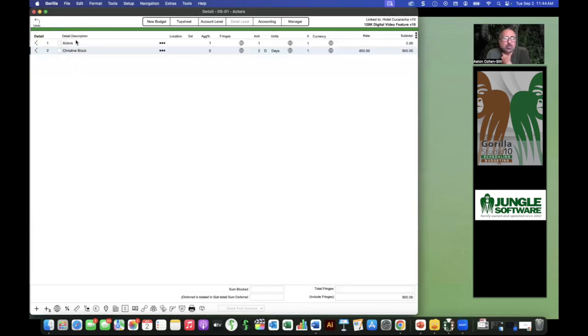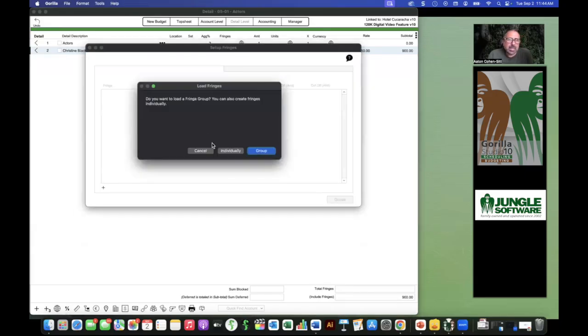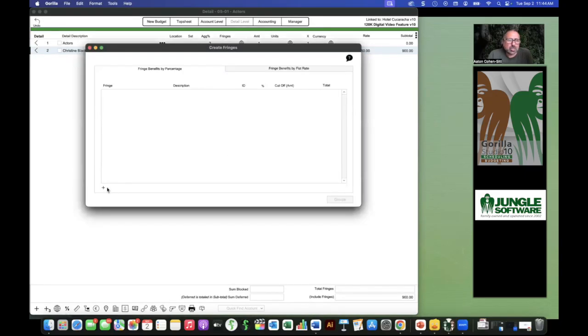Okay, so let's say we want to add a 21% fringe, well, let's call it a SAG fringe. And so we can add it to other actors, not just Christine. So we're going to go down here to the fringe button, and we're going to create a fringe right here. I'm going to call it SAG, and I'm going to give it a percentage rate of 21. Okay.